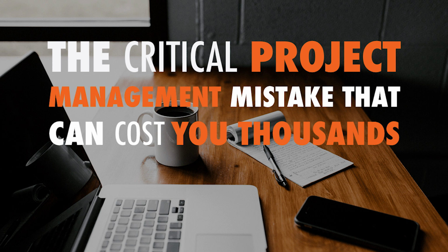And so what needs to happen is, not only should there be one point of contact with their business, but that one point of contact should collect feedback, collect people's opinions, and then filter. They should be curating that information and deciding what is good and what is bad. So for example, what ends up happening if they don't do that, whether they're the only point of contact or whether you're getting the information in an email thread from 10 different people, is there'll be contradictory information.